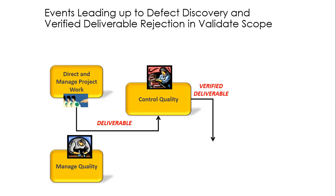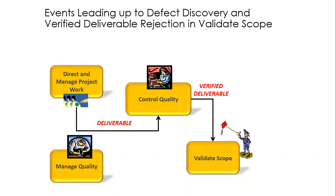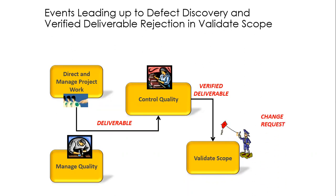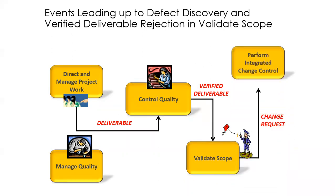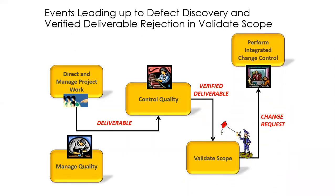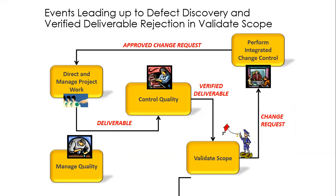The verified deliverable becomes an input to a new process we haven't talked about yet — validate scope. In validate scope, this is where the customer checks the deliverable for themselves. Here the customer is checking the deliverable, but it fails the test and therefore the customer requests a change. That change request goes to perform integrated change control again, where the change control board will review it and, assuming they approve the change request, it goes back into the cycle.